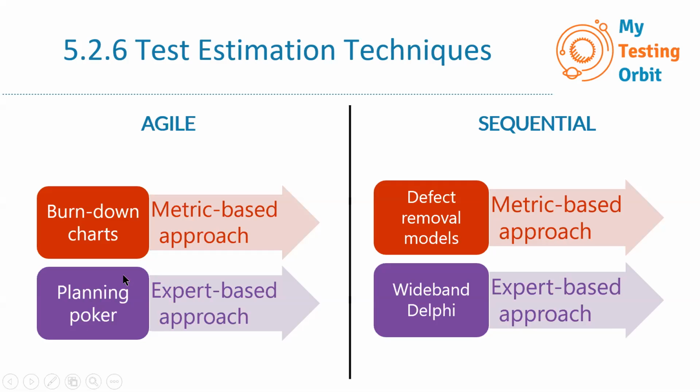Okay, so again, if you are not doing an agile project, then you might not be familiar with the term planning poker. So just to explain to those: planning poker is an estimating and planning exercise that is done during the sprint planning meeting. In that, planning poker cards are used for estimating effort and then coming up with a relative size of a user story.